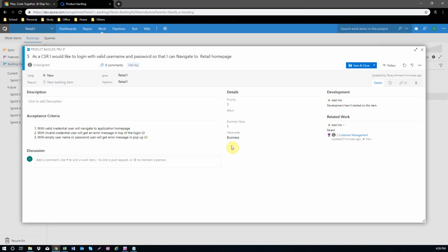Some companies follow t-shirt size, some follow bucket size, some follow poker cards, and a lot of companies nowadays follow pokerpoint.com. This is a website where people can go and vote for the story point, and they figure out the story point sizing. And they follow Fibonacci numbers, basically 1, 2, 3, 5, 8, 13, 21, and so on and so on.